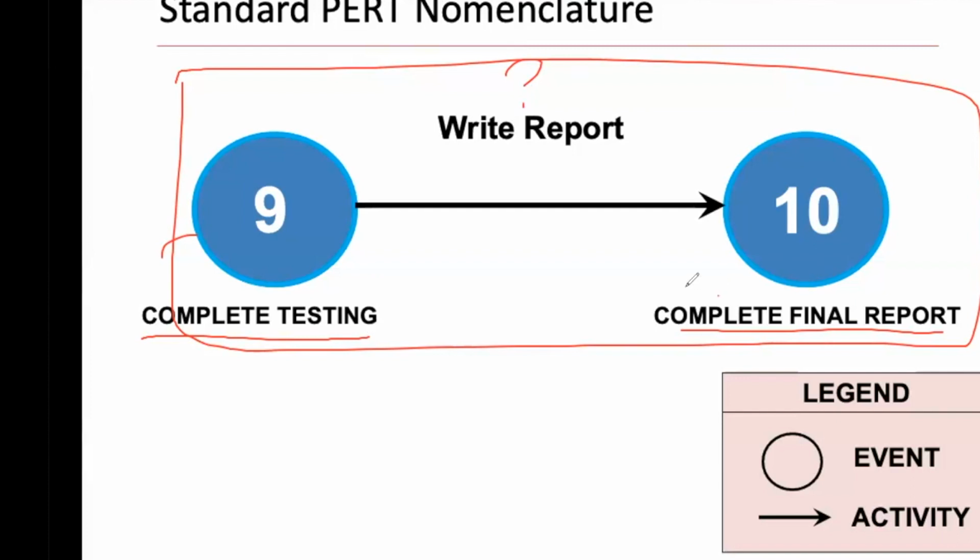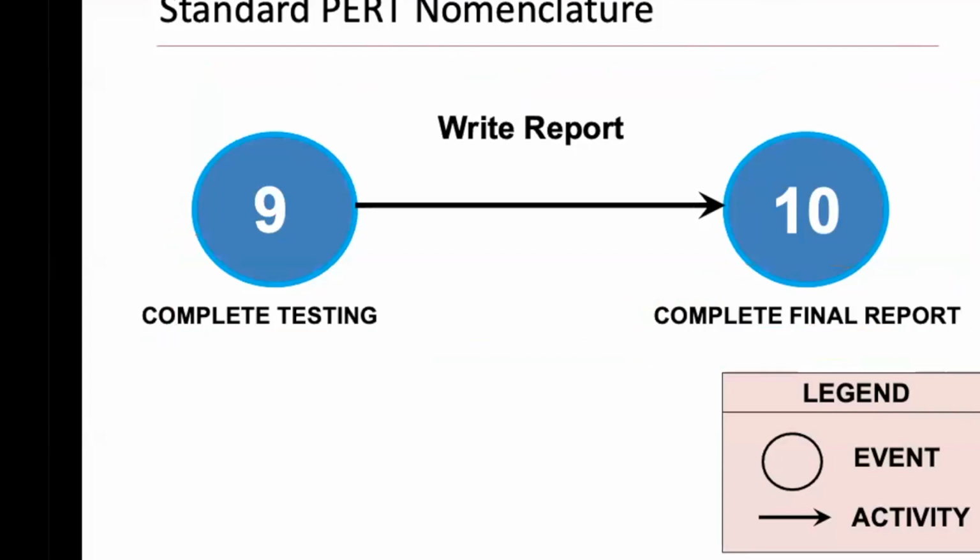We cannot just tell our boss that we completed the final report, and when he asks, is the test complete, say no, they're going to complete it 1 week later. Well, how come you wrote the final report before the testing is complete? That's what I mean by sequential. It's somewhat similar to waterfall. All the arrows show you this should be complete before the next one starts. So that's what you need to do next after the WBS.